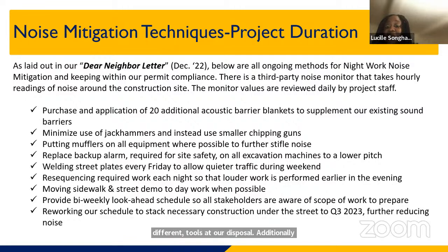Additionally, where it is safe, we have put mufflers on all equipment to further stifle the noise. We have replaced the backup alarm that is required for site safety on all of our excavation machines with a lower pitch one. Unfortunately, because it is a large tool, we can't just do away with the backup alarm. We want to make sure that our workers are safe during this construction, but we have lowered the pitch of that backup alarm.